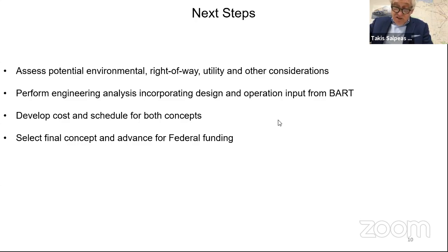Definitely, we need to check the right of way if we have any new penetrations, any new encroachments. I'm very mindful of utilities and what utilities may create for a project. And although I understand VTA has many years of work in utilities engineering, I'd like to see this myself and address further the considerations.